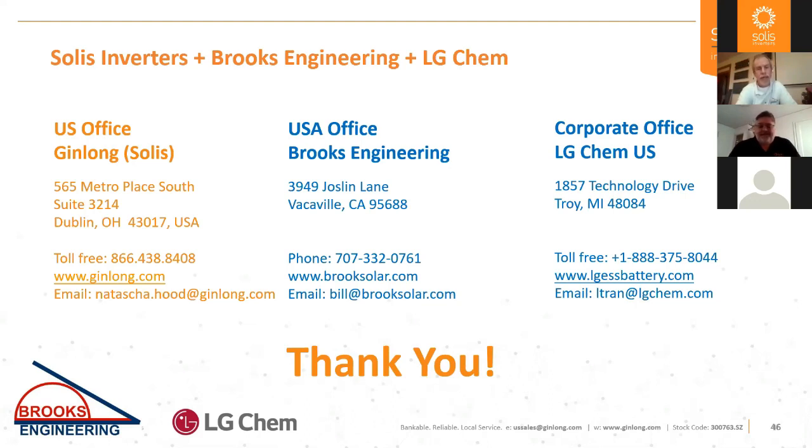Yeah, really spend, I'd say, half a day working on what loads are going to be operating on these systems, and pre-test them. You can know exactly what the loads are, turn everything on that's going to be on those circuits, and then once you get it all set up, don't just assume it's going to work. Basically dry run the heck out of these things.